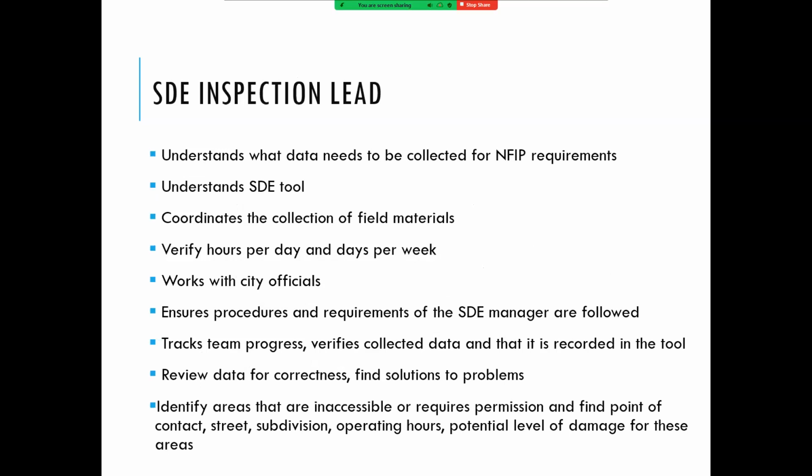And then again, if you have an inspection lead, that they understand what the requirements are, all of the elements that need to be evaluated on the structures, understanding the tool, is coordinating the field materials, verifying the work hours, working with the city officials, making sure that your instructions are followed, tracking the progress, making sure that's staying on track, reviewing the data.